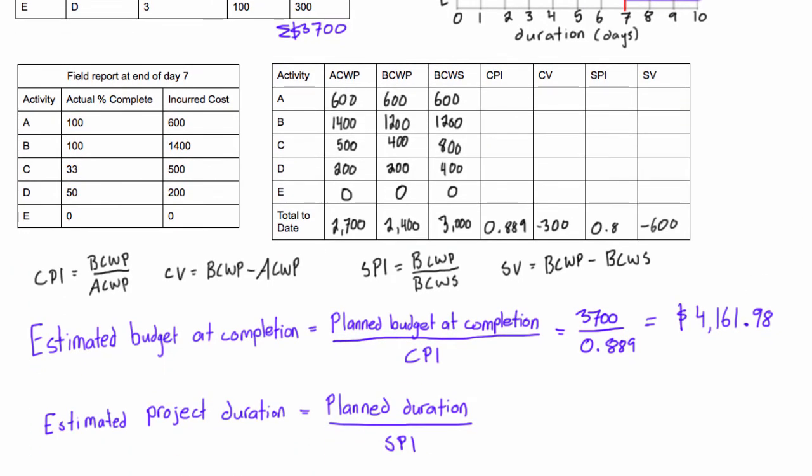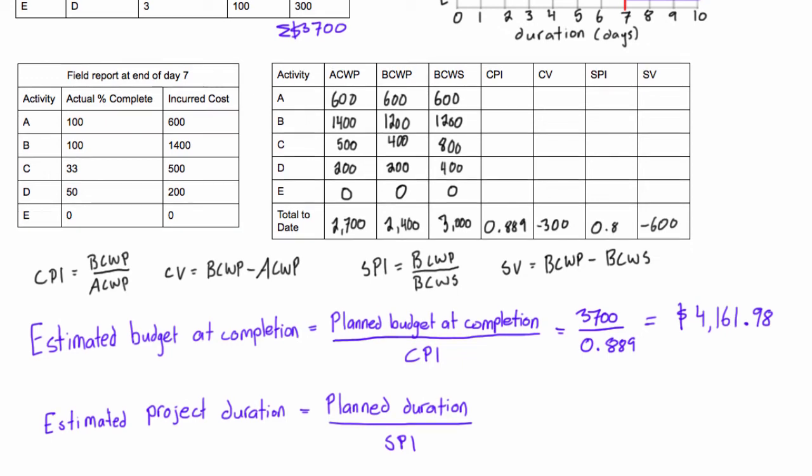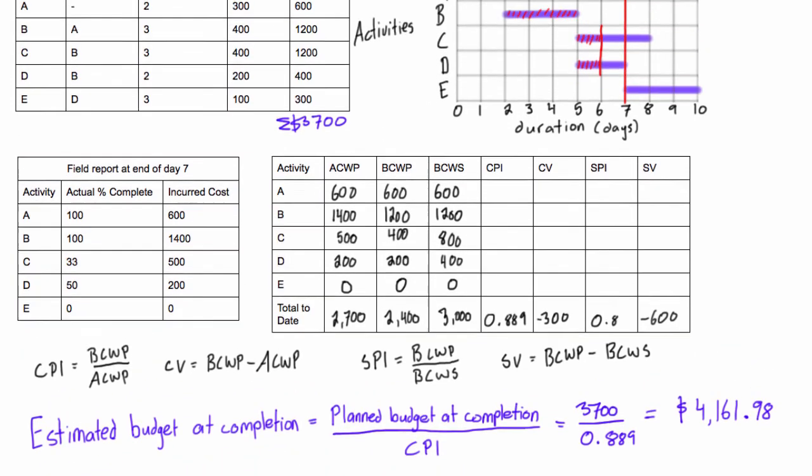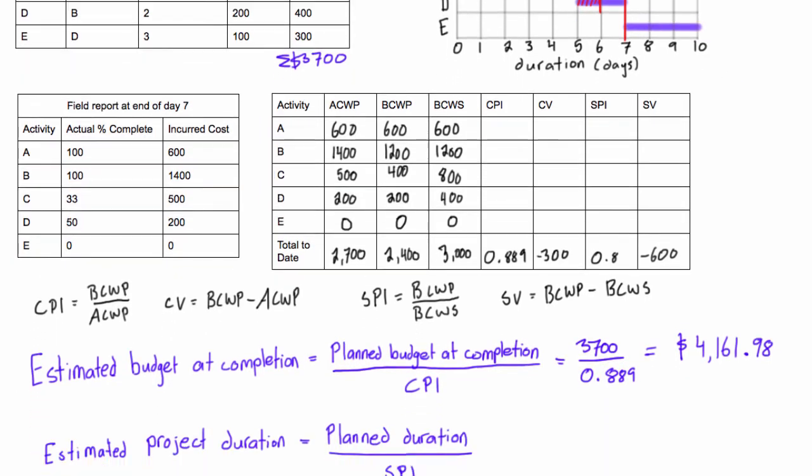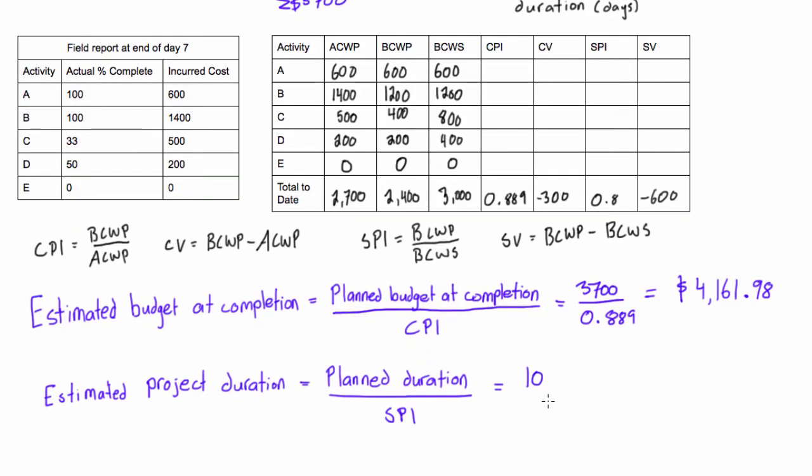So the next thing to look at is the estimated project duration. We just need the planned duration over the SPI. The planned duration we can figure out by doing a PDM network diagram or we can also use a Gantt chart. We're seeing here that our planned duration is to be 10 days. If everything goes as planned we'll be at 10 days, but it looks like something might happen that we might not be hitting that.